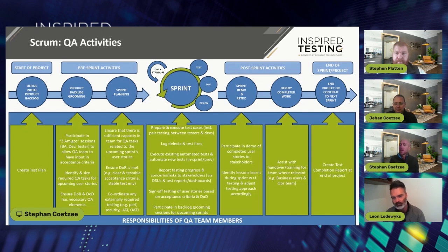The daily stand-ups are critically important. I found, for example, teams that use Jira setting up dashboards with live tracking of current defects, those kinds of things are critical so that anybody can look at the current state of defects at any point in time, even your testing progress, if you've got tools like X-Ray or any other plugin tools. So whatever tech stack you use, just keep that communication open.